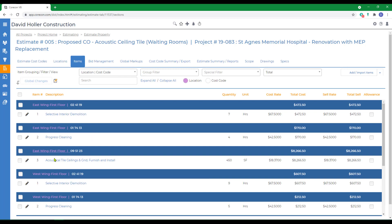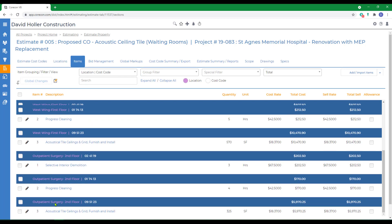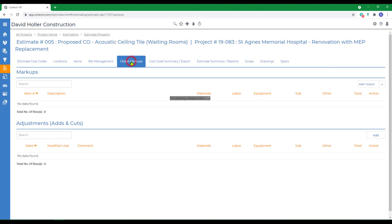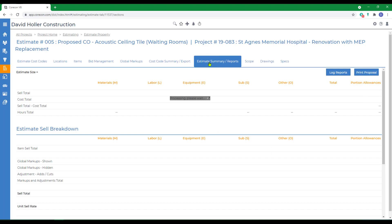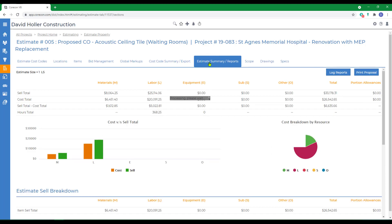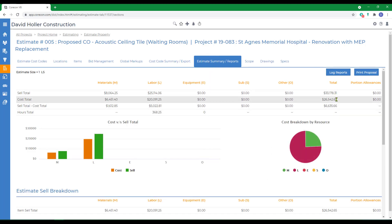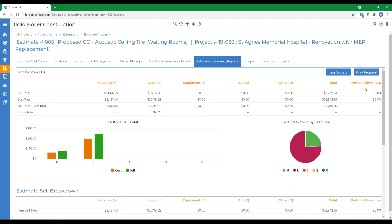And we're going to switch the view to Location and Cost Code, you'll notice that there's three locations that have been added. You may also want to notice that their global markups have already been added, and if we go to the Estimates Summary, you can see a sell rate, a cost, and a projected gross profit on this change order. A proposal could be printed here.